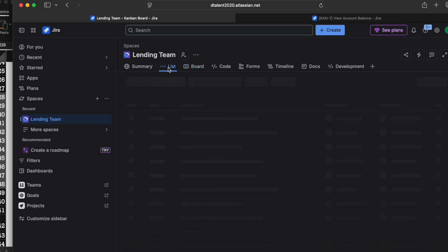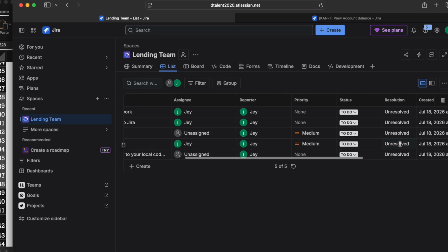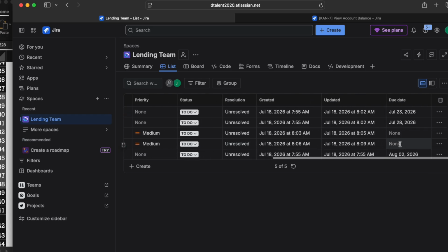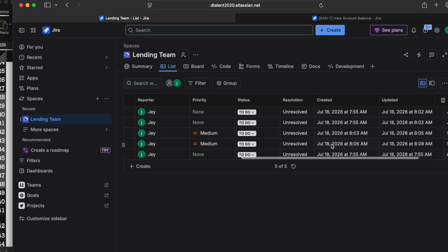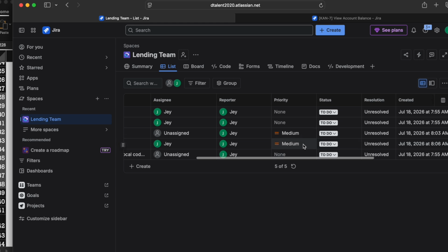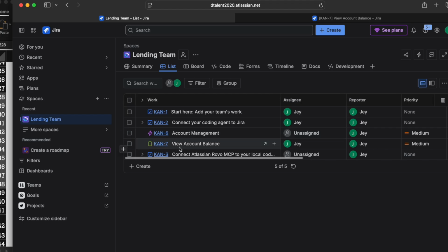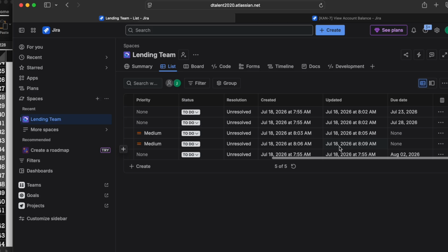Okay, during the sprint planning, we will plan how many stories we are going to take. After stories, here we have priority. Here you see status is to do, and also we can give the story point updated. Okay, I don't see the story point to give here, but usually we can give the story point, how many story points this will take. And we can pull into a sprint. We can assign a sprint.